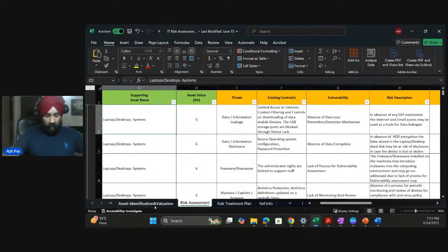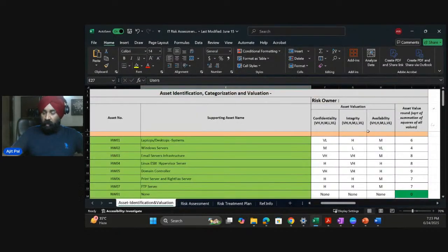You see here, these are ratings. By looking at ratings, you will say it's qualitative, because in qualitative, we give ratings. But ratings will not help you in taking an informed decision. That's the reason we assign numeric values to the ratings, and this is what we call semi-quantitative.